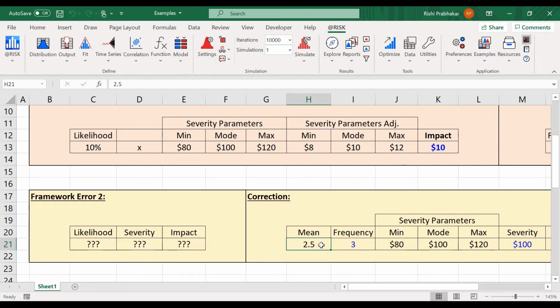Maybe if I'm looking at storms and I go to the BOM, or the Bureau of Meteorology, and they let me know data over the last 30 years or something like that, and it says that the average number of storms of a magnitude that I'm interested in, so things that could actually cause me damage, the average is 12.6 per year. That's perfectly acceptable. And you can see that there are reasonable and robust ways of producing that kind of information. Obviously, in the end, we might just end up estimating.